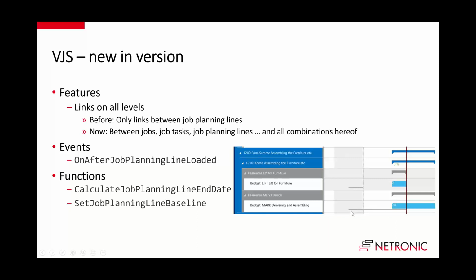The screenshot doesn't make much sense with this starting on the weekend, but anyway, now this got moved to be here, on, I would assume, a Wednesday. So it got moved out a few days so that you can see what was the plan before and what is my current plan. It is not comparing plan to actuals because we don't have any timesheet entries here, but it compares initial plan to current plan.